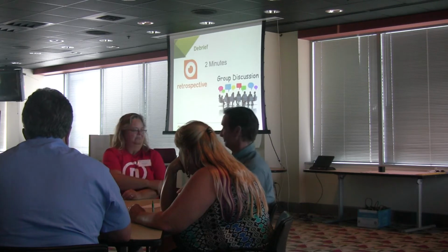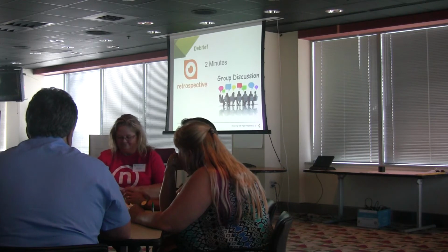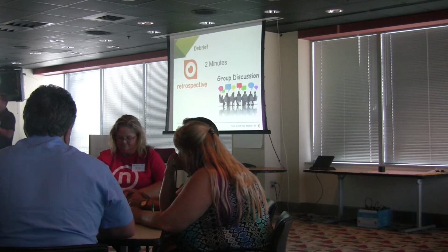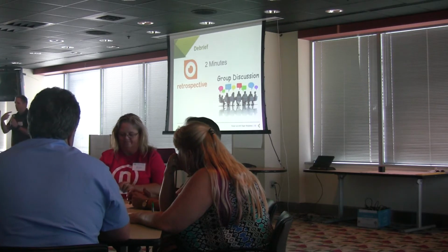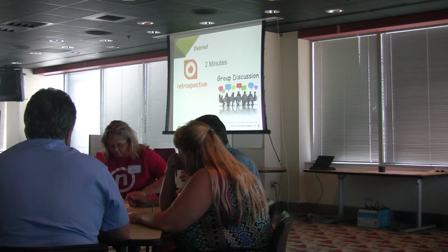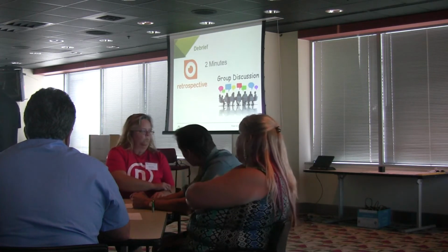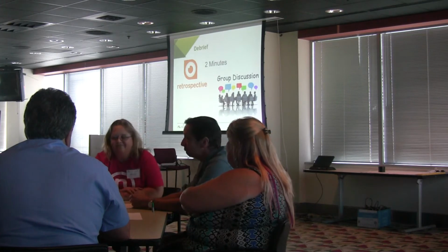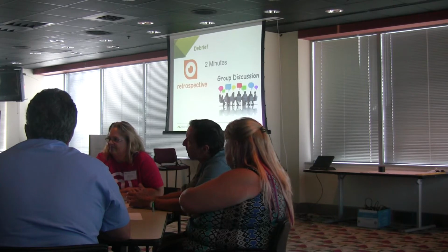The other might be that you change the WIP limit. You might adjust it, because we saw it with one way, we may up it, we may lower it. As you saw on the diagram I showed on an earlier slide, the first column had a WIP limit of 4, the second column was 7. It might be because of the number of people, or maybe the tasks take less time, but they still had a pretty even flow, right? So those are some of the levers that you can manipulate.